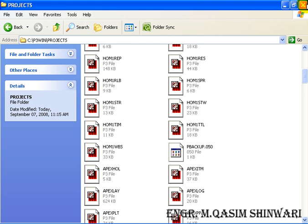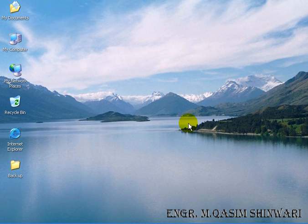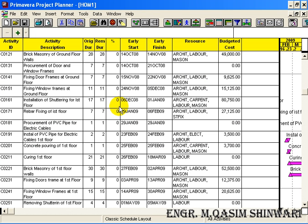The second precaution about which I should tell you is that there is no undo command in Primavera Project Planner. If you have done a mistake, you have simply to redo manually. There is no Control-Z combination, there is no redo. So be careful while changing or modifying the existing data or creating the new data.